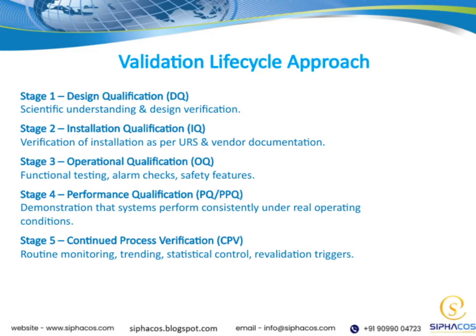Starting with Stage 1, the Design Qualification, or DQ. Here, we focus on establishing a scientific understanding of the system and verifying that the design meets the intended requirements. It's about making sure we've got the right design from the start. Moving to Stage 2, the Installation Qualification, or IQ. This stage involves verifying that the equipment or system has been installed correctly according to the user requirements specification and vendor documentation. It's essential that everything is in the right place and properly configured.